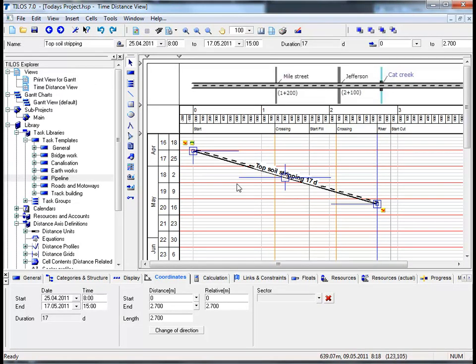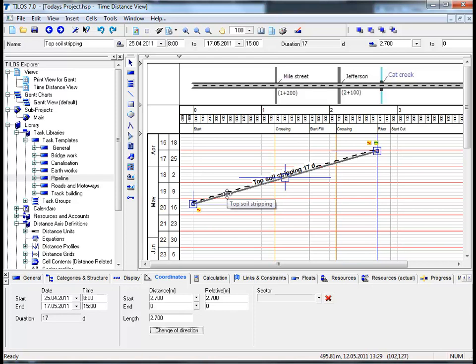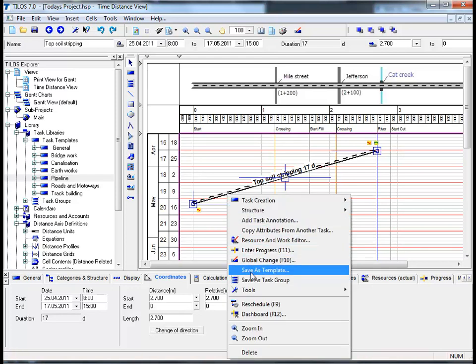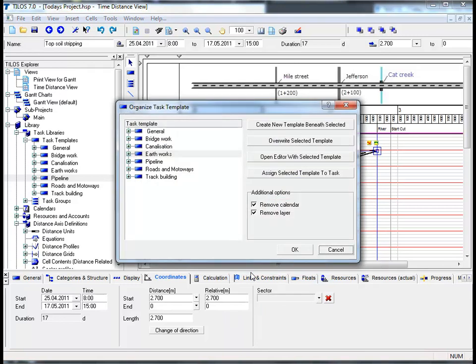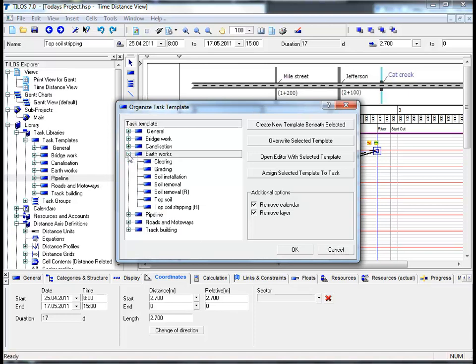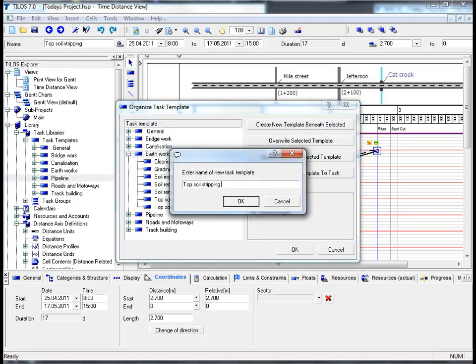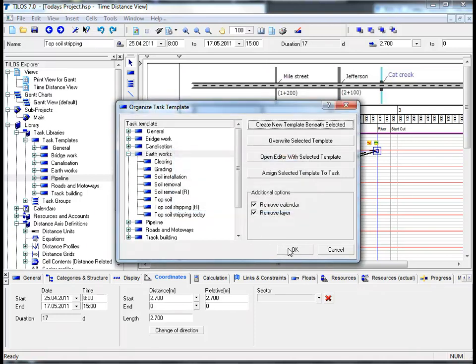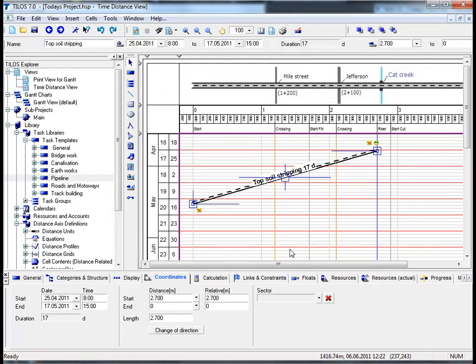Before saving the task as a template, let's change its direction first by going to the coordinates view tab and clicking on change of direction. Moving back to the task, click the right mouse button and choose save as template. Since repetitive work is carried out at different locations along the distance axis in linear scheduling, it makes sense to save the task as a template for future use. Choose Earthworks and create a new template beneath the selected, choose a name, and click OK twice - the task is now saved as a task template.